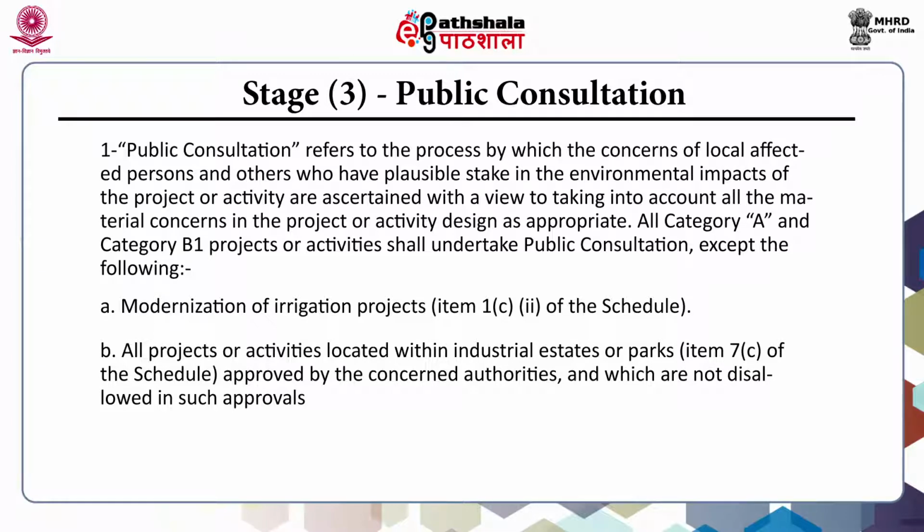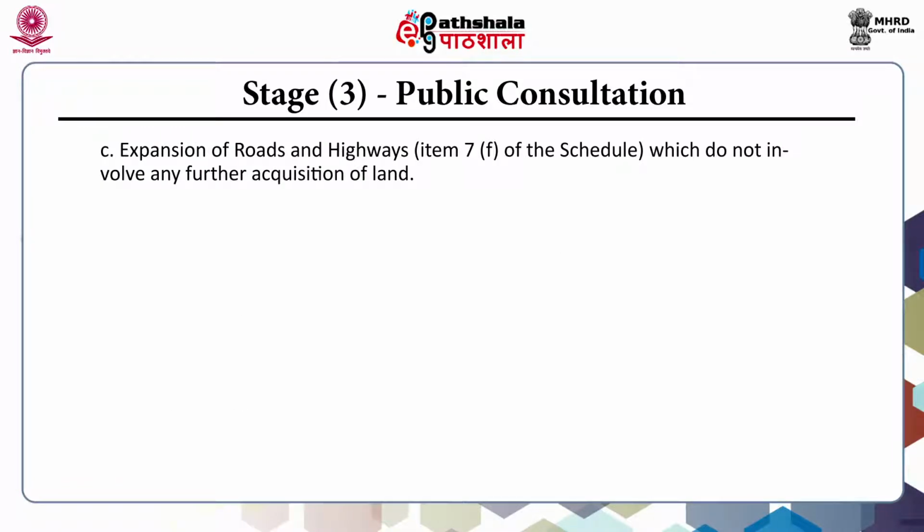All projects or activities located within industrial estates or parks, that is item 7(c) of the schedule, approved by the concerned authorities and which are not disallowed in such approvals. Expansion of roads and highways, that is item 7(f) of the schedule, which do not involve any further acquisition of land.